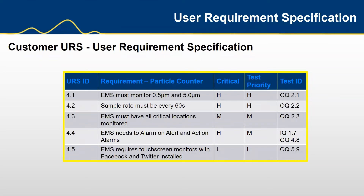For customers who do understand EMS systems, they typically present us with a URS — a user requirement specification. I really love it when customers have done this groundwork and understand what they need. Typically an external consultant is used, and in some cases the internal knowledge is in-house. When we get a URS we diligently go through it and have a response mechanism called a URS traceability matrix — our way of responding to the URS with a confirmation of what we can and cannot deliver. I've never seen a URS where we are completely 100% able to deliver everything, so we offer alternatives and are transparent about how we're going to meet the requirements. The key is being transparent and showing with examples how you can meet requirements using alternative methods and still get the same results. With a URQ combined with a URS, we are already moving in the right direction to a smooth process where success is inevitable.